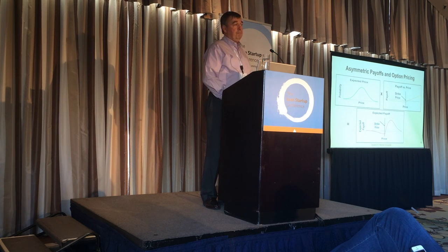Huge asymmetry in payoff. If you're a drug company, do you want to work on candidates that have high variability in them or low variability? High variability are the only ones that will turn out to be the blockbuster drugs. How do you manage risk? You have a large portfolio of candidate molecules. That's the way you eliminate the risk. You don't bet on the things that are safe bets.